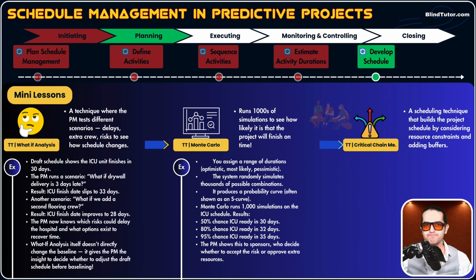Guys, remember in estimate activity duration process, we said, hey, there are some risks for some activities, okay? Let's add some buffer, contingency. Remember contingency buffer. Like if an activity finishes in 5 days, but this activity has a very critical risk assigned to it, so instead of 5 days, add 2 days as buffer.